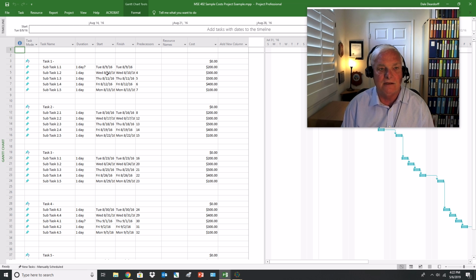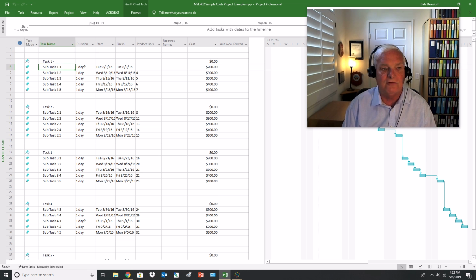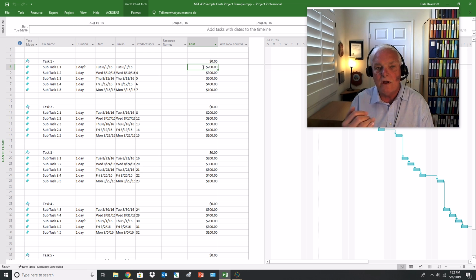This is if you're looking at how to create costs by a project piece. So this is by element, not by person. There's a cost associated with a subtask, and you can just go in and tag what that cost would be. I've laid out 4 different tasks here, 4 series of subtasks. I've laid in the duration, how long it would take, and a start and finish date.